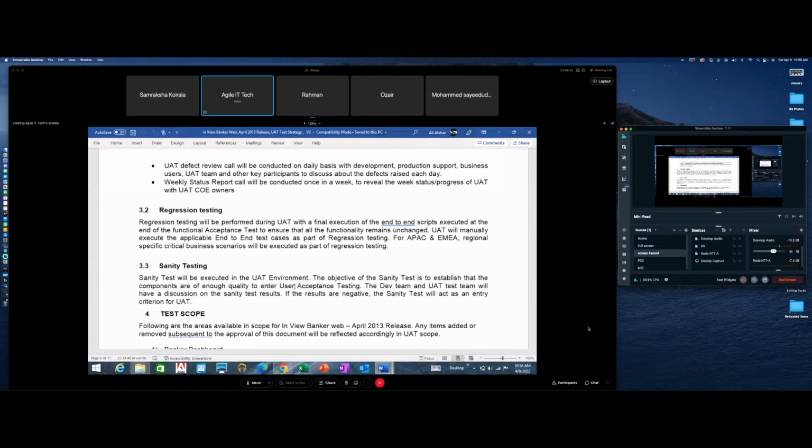Depending upon what you're testing. A, B, C, D? 1 plus 1? No, man. 100 test cases means you wouldn't raise your head off the damn table. Okay. Maybe Uzair is still trying to test his Excel. I'm talking about functions of an application, Uzair, not an Excel. Right? On an average, it's about 40 to 50 in a day.